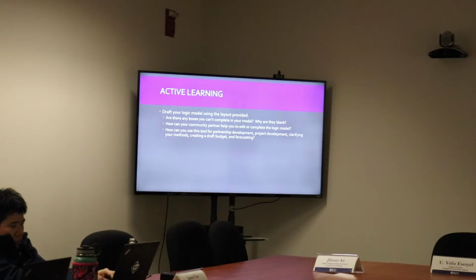The activities are the major activities necessary to plan, implement, and evaluate the project. And then you really do want to list who's responsible, especially as you develop your project with your community partner, so that everyone knows the community partner is going to do this thing, or I'm going to do that thing. Again, those are clear boundaries as you're negotiating. So: develop and implement the memorandum of partnership, develop the research protocol, timeline with the team, IRB approval.